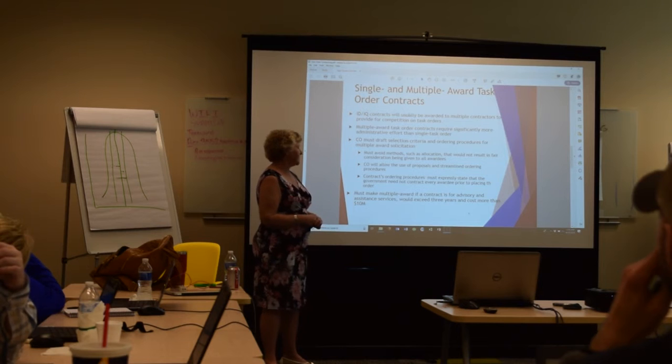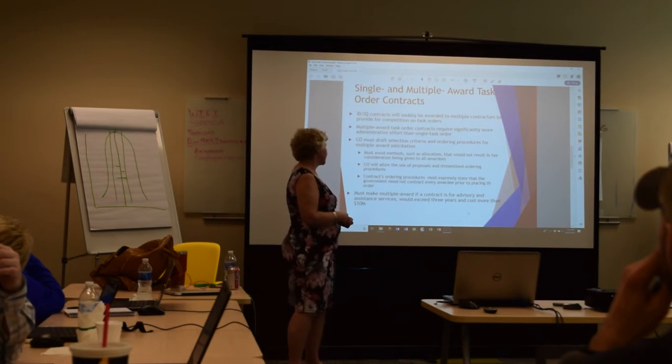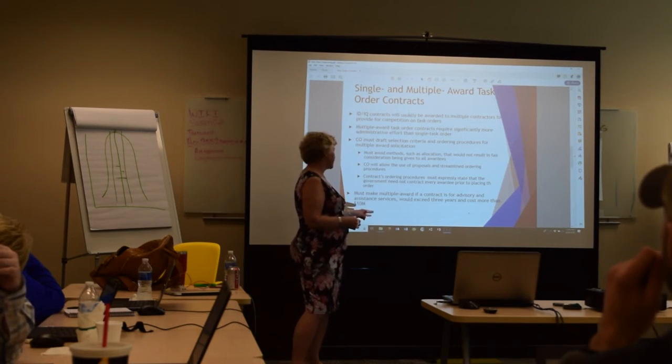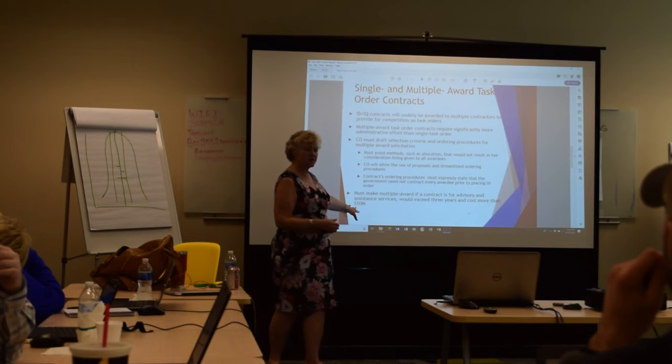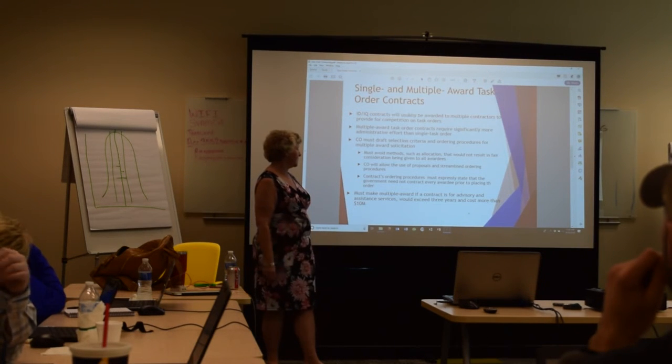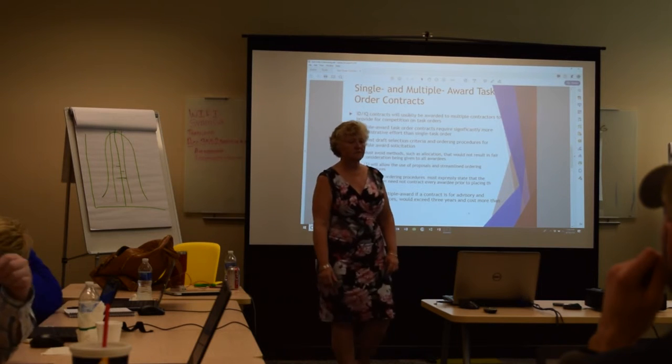They must make multiple award if a contract is for advisory or assistance service, would exceed 3 years, and cost more than $10 million. So this is where they actually have to go to multiple award under that scenario.